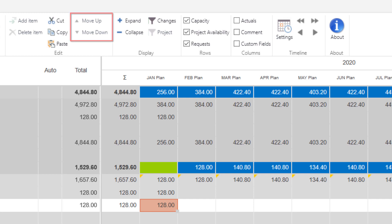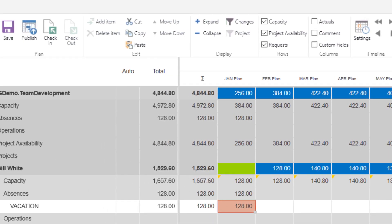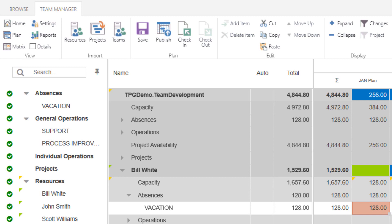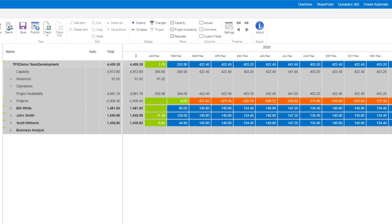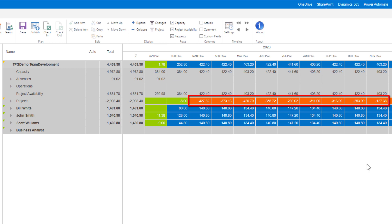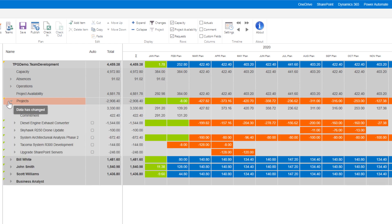Next, add the projects that your team is working on. Again, if you use PPM, you can pull that information right into Team Manager using the Projects icon. Here you can see reddish-orange background values across various months where there is a request that has not been committed to. We can see that this is the case on the Projects row from the month of March onwards. By drilling down, we can see which project the requests are coming from.